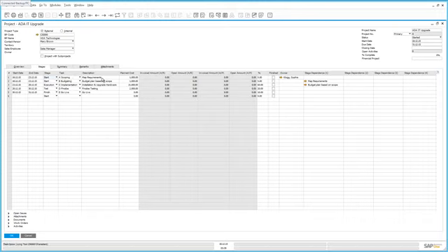And this is where we're actually going to map the customer requirements. Tasks, of course, can also be defined based on your project requirements. We then estimate a planned cost associated with this stage. And likewise, you can see any invoiced or open amounts relating to this particular stage of your project as well.